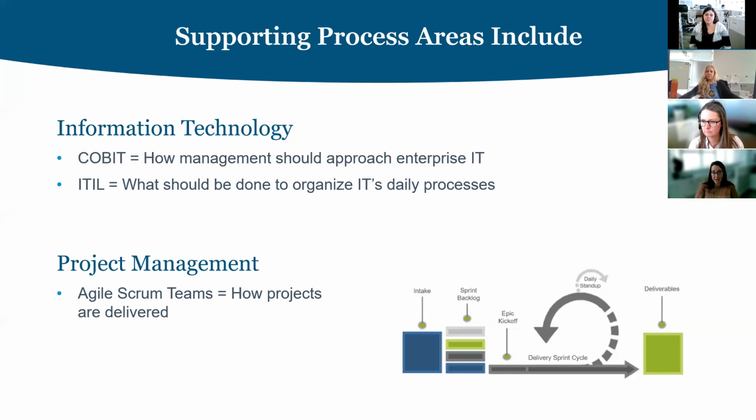I can speak from that lesson learned: we really found that with your resources, you have to jump in and dedicate them to that team, because when they're split between maybe multiple groups, or what I'm going to call their day job and the team, it becomes very conflicting for them. What you can do, and Scrum really accepts, is that there's just a portion of your work, so you almost have ongoing stories that allow for some of that.